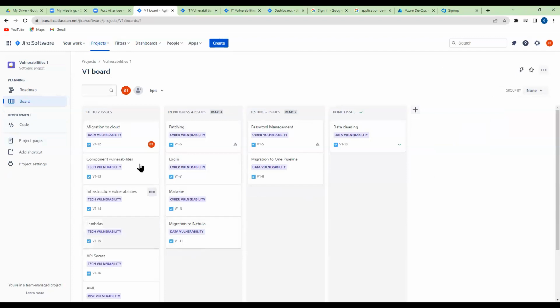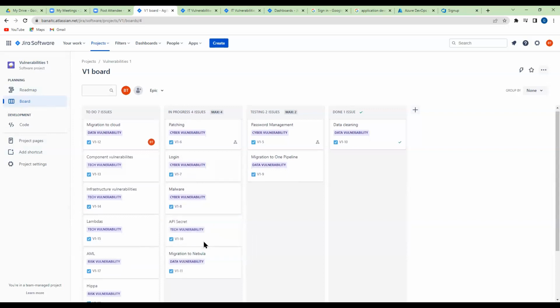This, as you can see, is a Kanban backlog. What makes you know that it's a Kanban backlog? You can set the WIP, the work in progress limit. Like this, the maximum is 4. If you go above 4, what happens? Like this, we want only 4 to be here. Look at this. If I go above 4, if I take this and put it here, the flag. That means there's a bottleneck here because the maximum here should be 4.